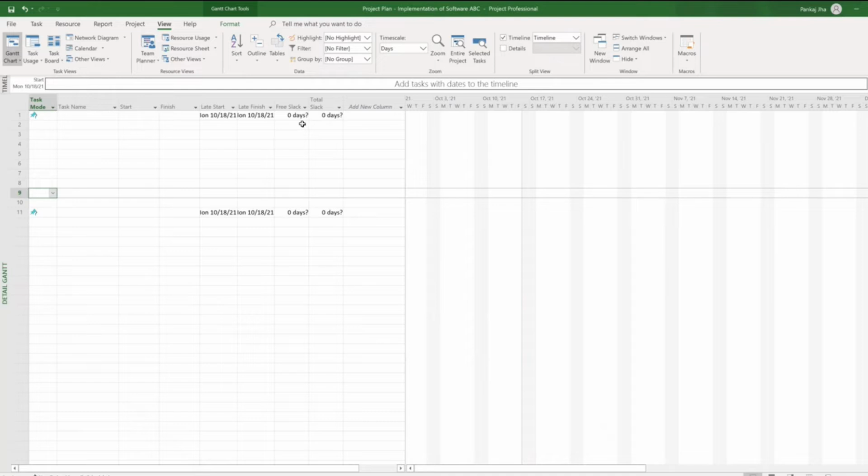Okay. Next is we have to set the calendar. We have to define the vacation, because obviously if you are not going to define the vacation, then some of the tasks will appear on the vacation day, but then actually it is not going to happen, because that particular day is a vacation day, and you have not defined it as a vacation day in the project plan.